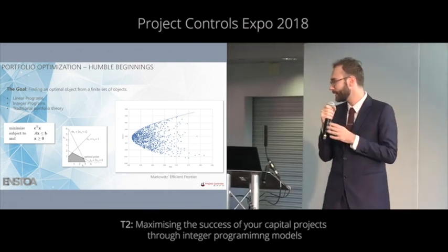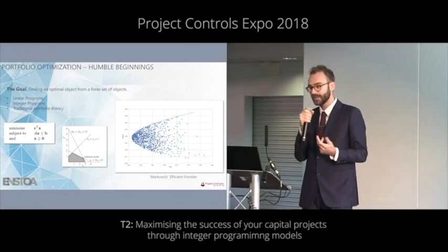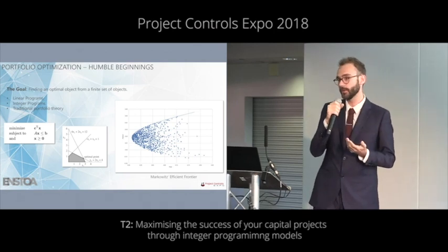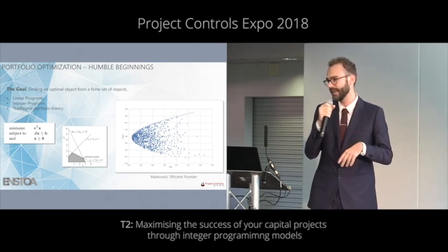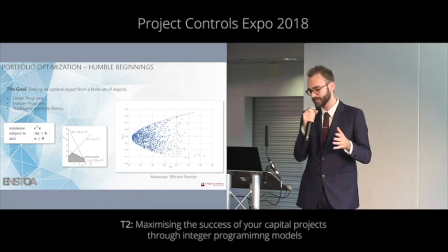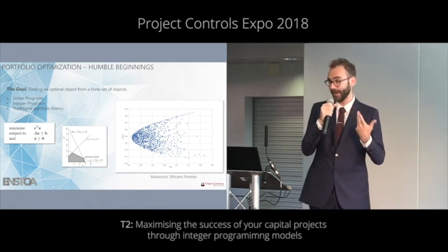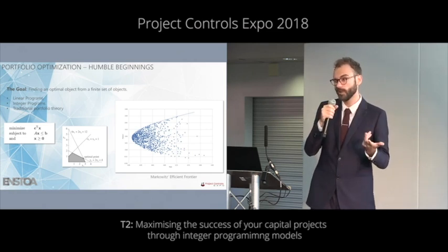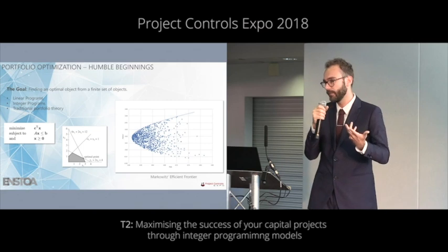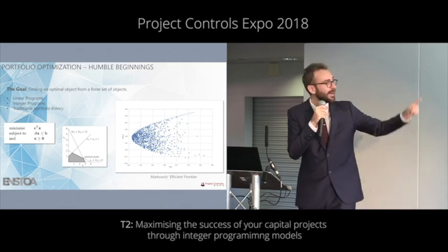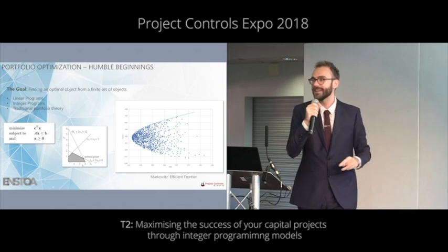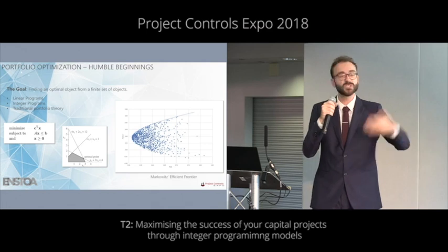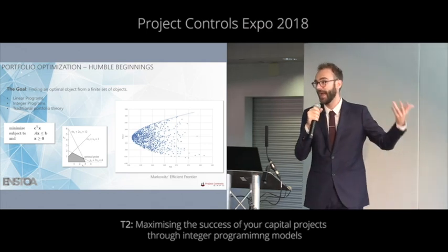Why is this important? The methods for solving integer programs are significantly different and significantly more complex than other mathematical programs that do allow fractional solutions. They are based on wholly different methods, and it's actually very, very poor practice to take that 2.8 solution and say, well, 2.8 is close to 3, so we should just go ahead with 3 projects because we rounded up. That seems like an intuitive thing to do, but the mathematics underlying the way to get that solution turns out that in almost every case, that's actually a very, very bad thing to do, which is why we're presenting the integer program that we have.